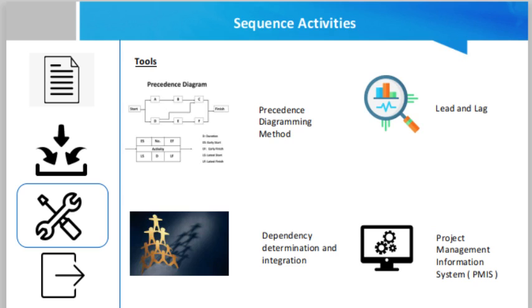For example, one may choose to slice a cucumber before a tomato for fixing a salad, and the precedence could take place either way. External dependencies are those outside the project scope and control, and are important enough to be considered. For instance, if the construction of your building requires strict compliance to certain regulations, you may have to address an external dependency situation if revisions are in the offing.